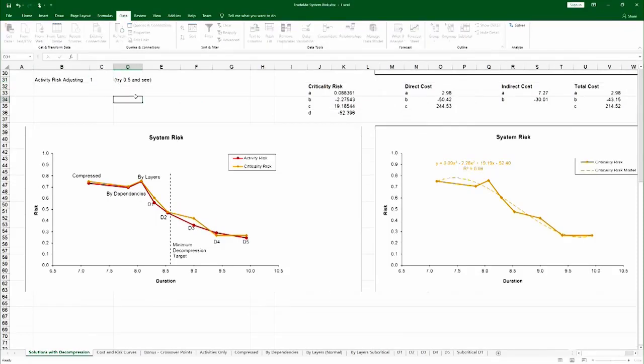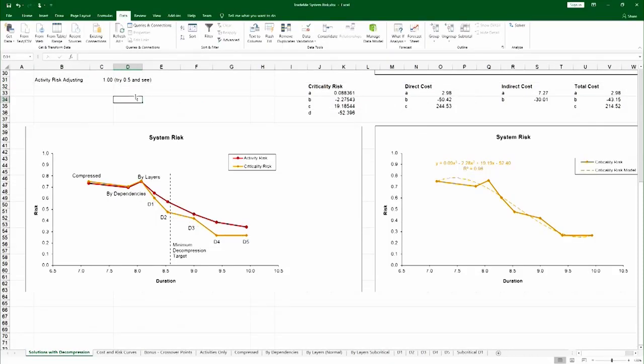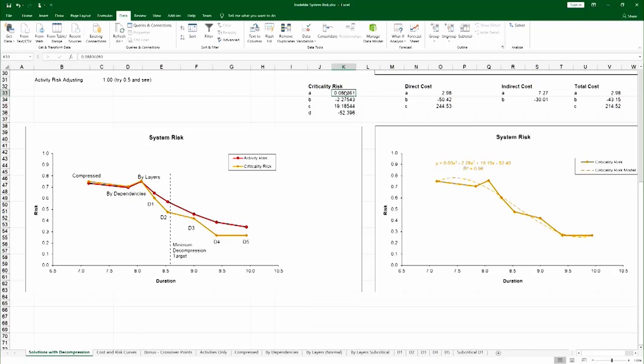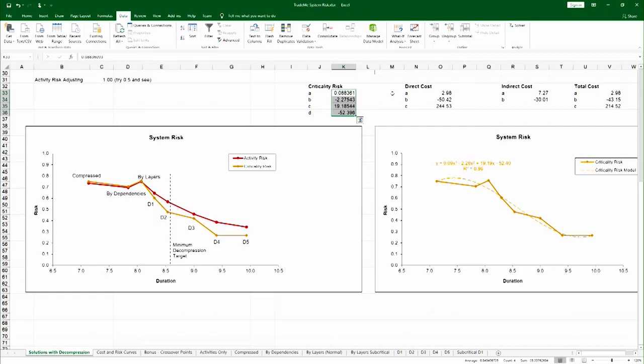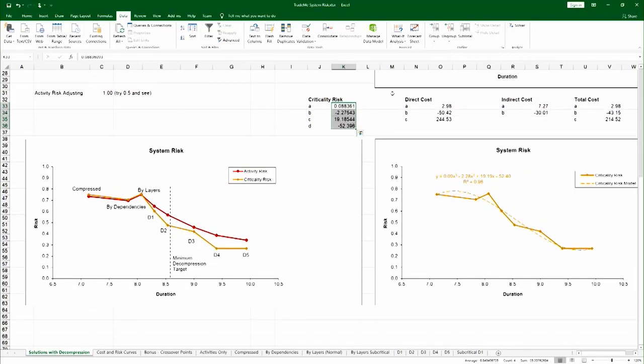Now, the design team decided instead of adjusting the activity risk, just use criticality risk in TradeMe. What you see here on the right-hand side, you see the risk modeling for the criticality risk. And those models are simply, these coefficients are simply copied over here. And literally the rest of the spreadsheet is done by using these numbers. It's a highly parameterized spreadsheet.